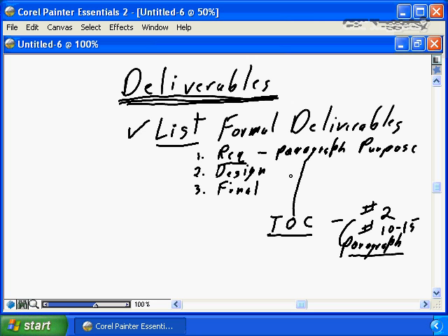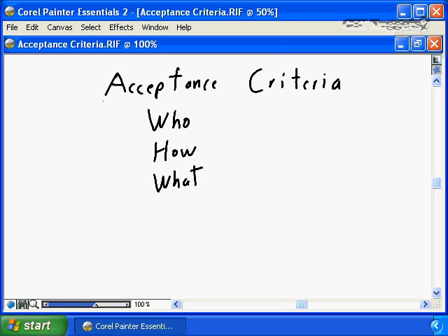I will get the benefit from this project that I expect to receive. The next step in the process is to define the acceptance criteria. How are each of the deliverables, how are each of the end products for your project going to be accepted? Only by clearly defining the acceptance criteria, i.e. only by defining the yardstick, the measurement factors that will be applied against the deliverables, the final products, will you truly be able to define the scope of what those end products should look like.